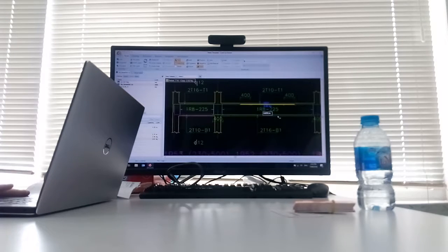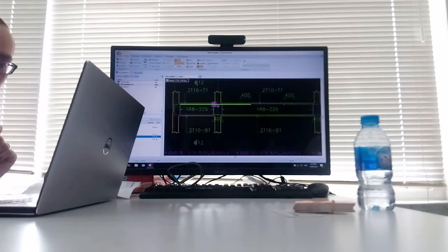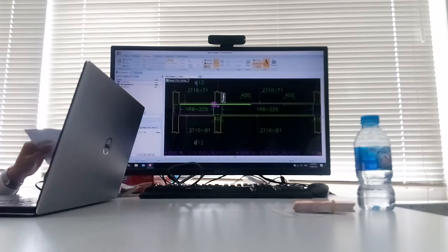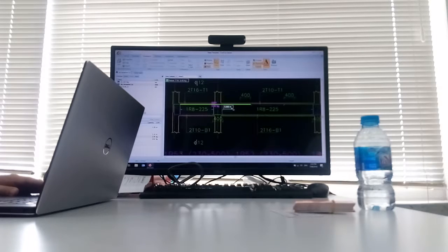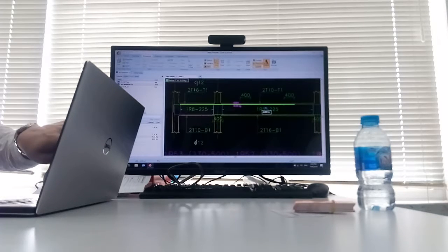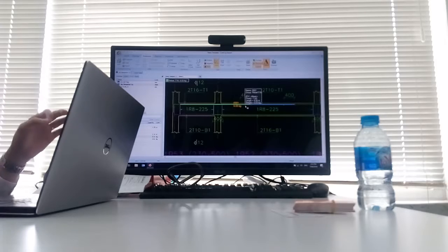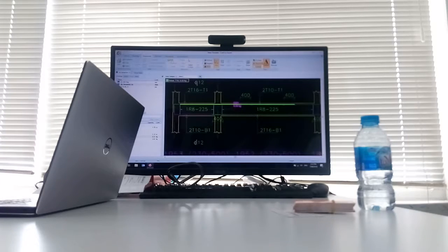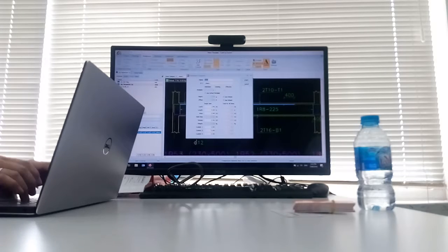When you do it this manual way, if the drawing does not show the lapping, you can see under this dimension tab here that you can manually add it. For example, I extend this line to show you. Let's say I show the line until this extent, and there is a lapping in between, but the line does not appear in your drawings. You come over to this dimension tab, see there is no lapping, then click the add button and I create the lapping by myself.